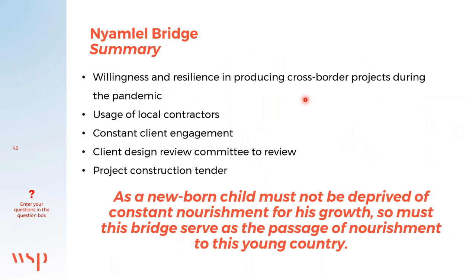In summary, this project showed WSP's willingness and resilience to produce cross-border projects during the pandemic. Usage of local contractors helped speed up the project after COVID-19 delays. Constant client engagement was required to keep the client updated each week. After this, the project will go into design review, where the design review committee will review the detailed design report and drawings before going out to construction tender.